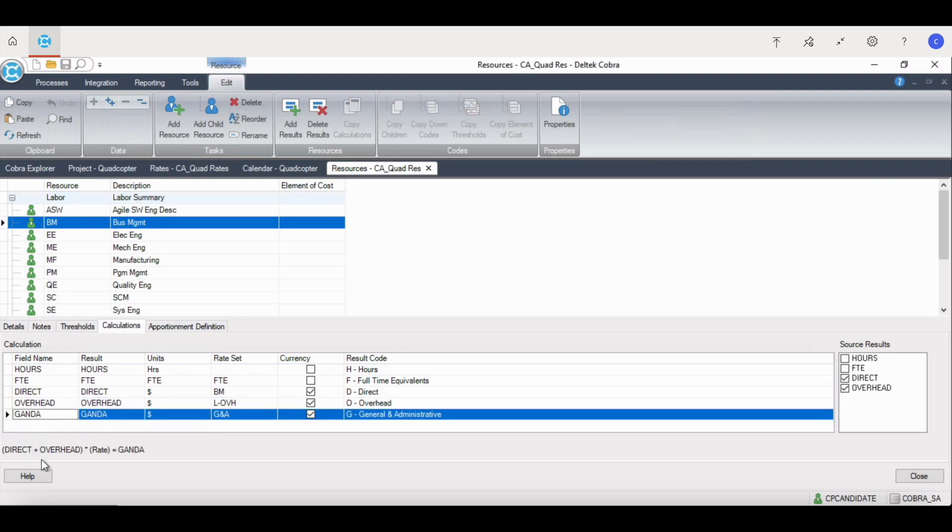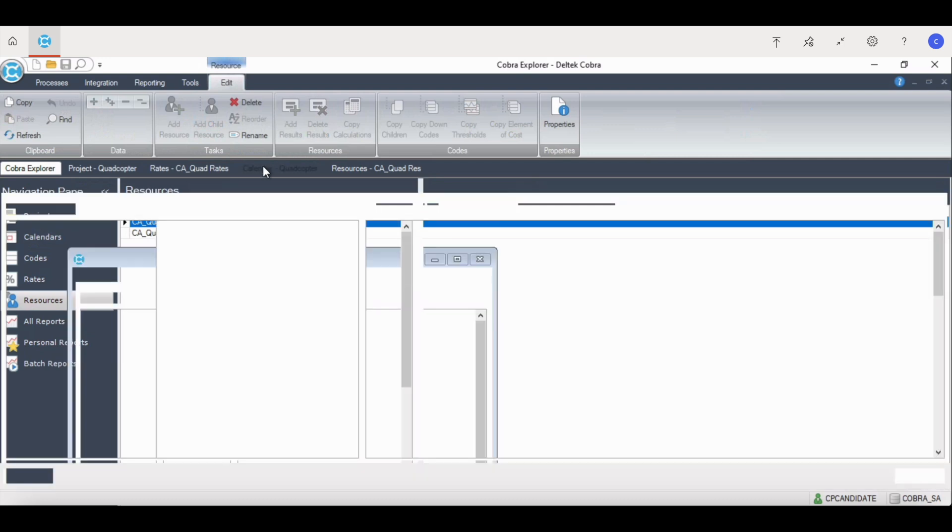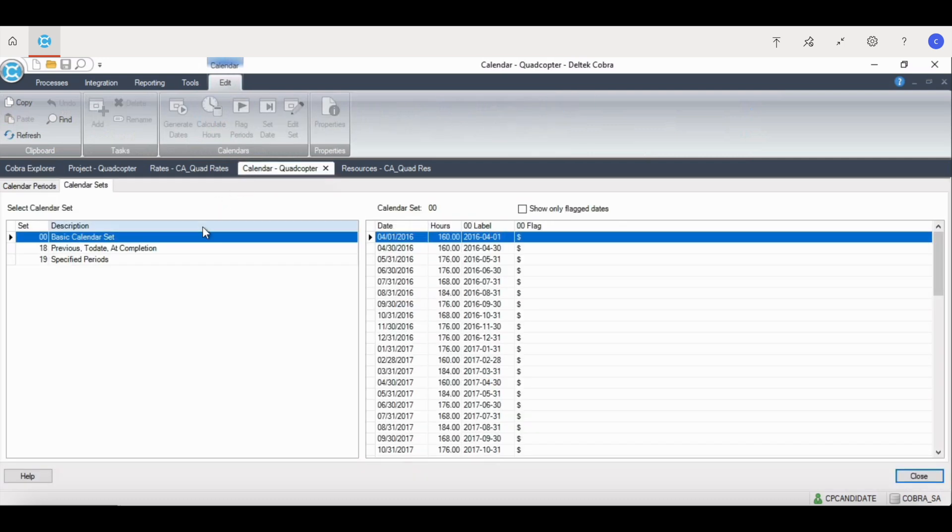The fiscal calendar is used as the basis for every report that is generated from the Cobra system. There are three standard calendar sets that come as a default. Calendar set 00 defines all of the fiscal periods in the calendar and is typically used to run the time-phase reports such as control account plans.